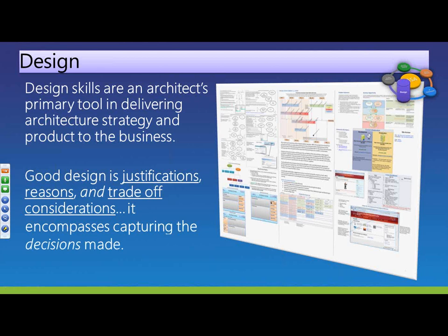One of the real key things about our architectural designs is we can trace back. So I can go to anything in the diagram here. This is something I call an agile all that I did. Somebody wants to make a change, and I could say, well, we need to go through change management because we made a conscious decision not to do that. And I can point to where we made that decision and talk about why we made that decision.